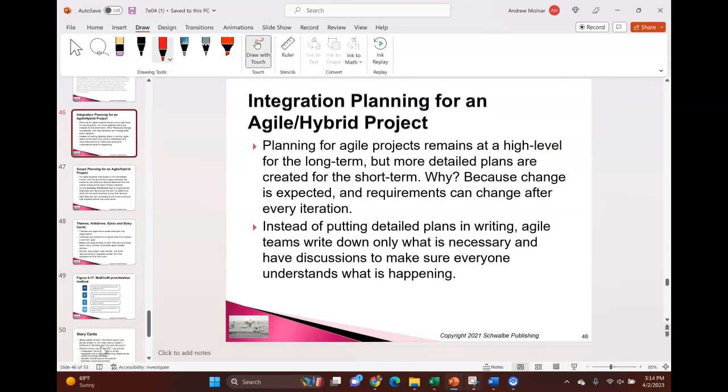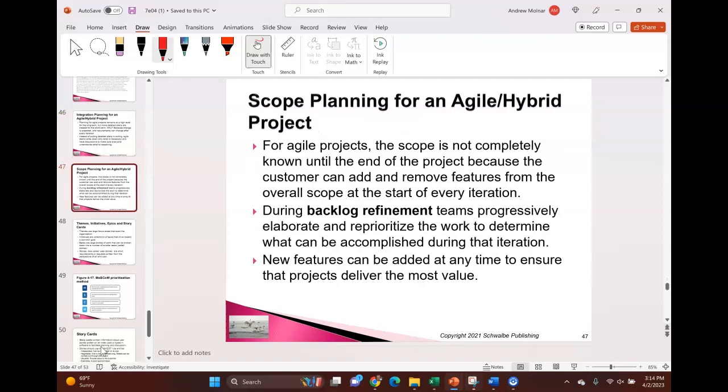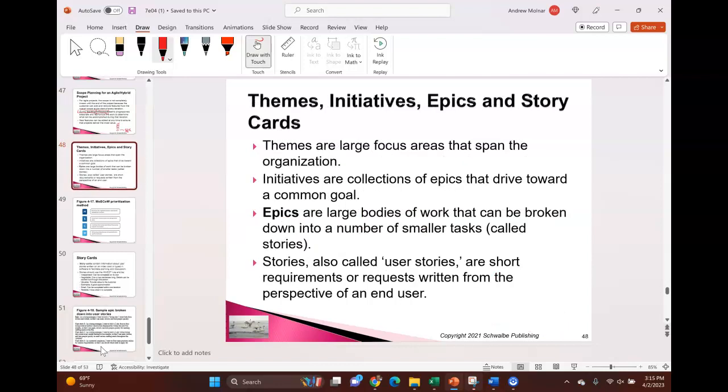It's the details. And of course, for Agile, which this course isn't about, but you could use some of that to be considered. You could still do a work breakdown structure, but in Agile, we're actually going to call that backlog. And we're going to refine that backlog all the time. So you remember we had user stories, and those user stories go into a backlog in a priority order, and you pull those into sprints we talked about in previous lessons. And just because you've set a priority doesn't mean you can't change it along the way. So you refine that backlog over time.